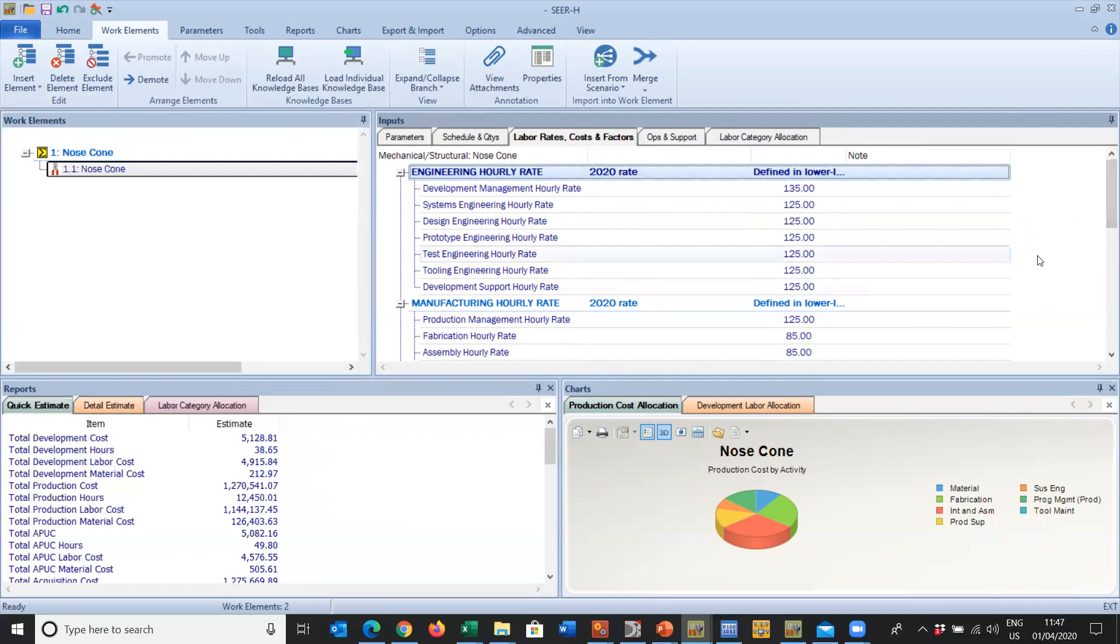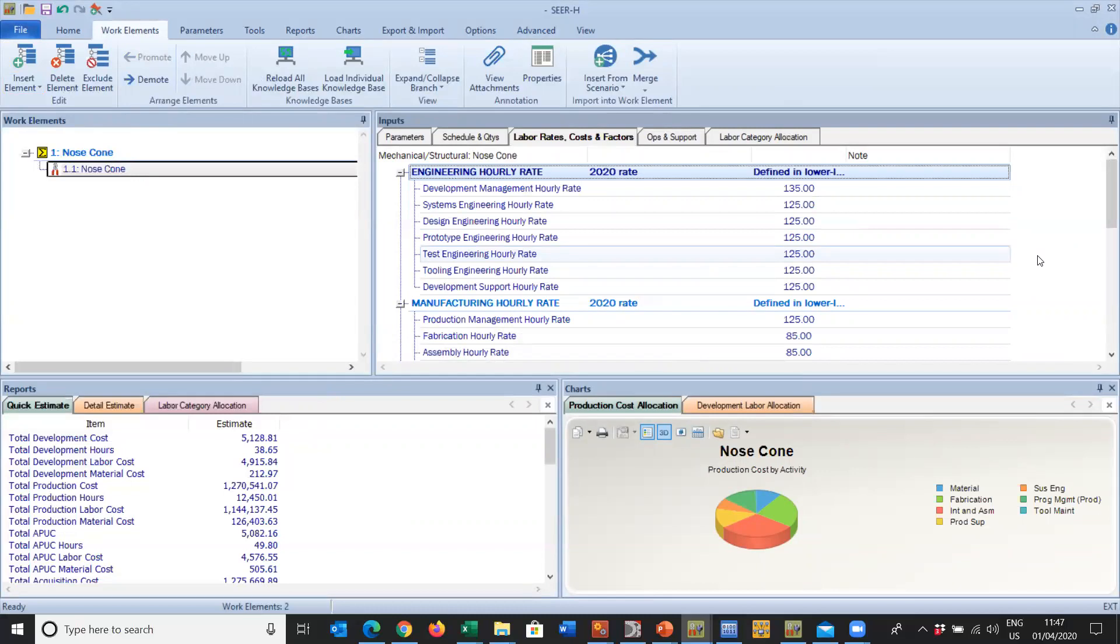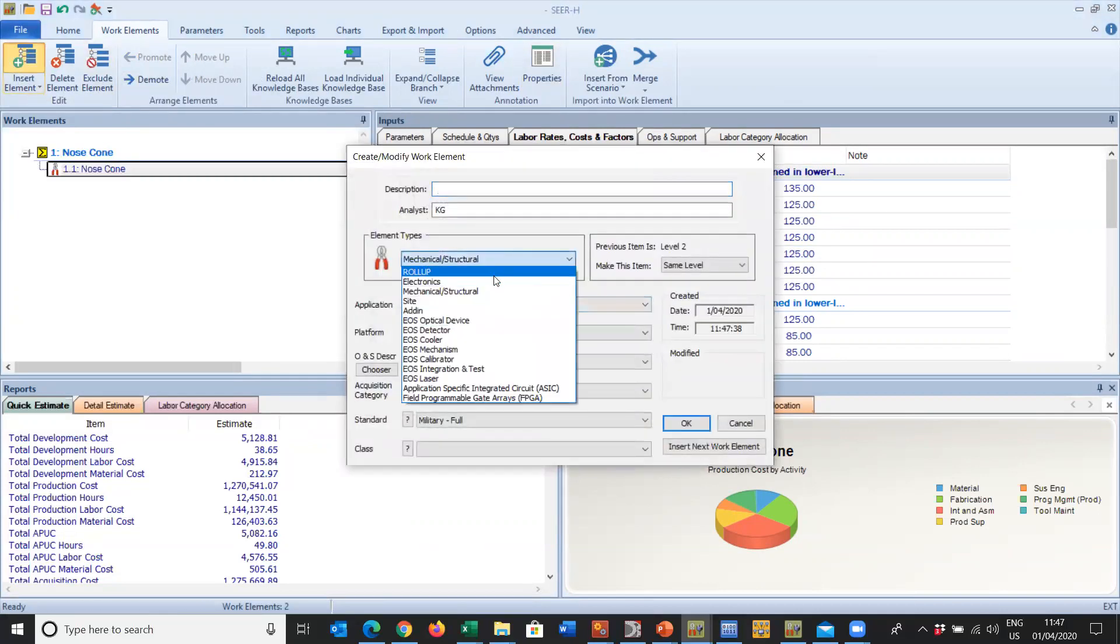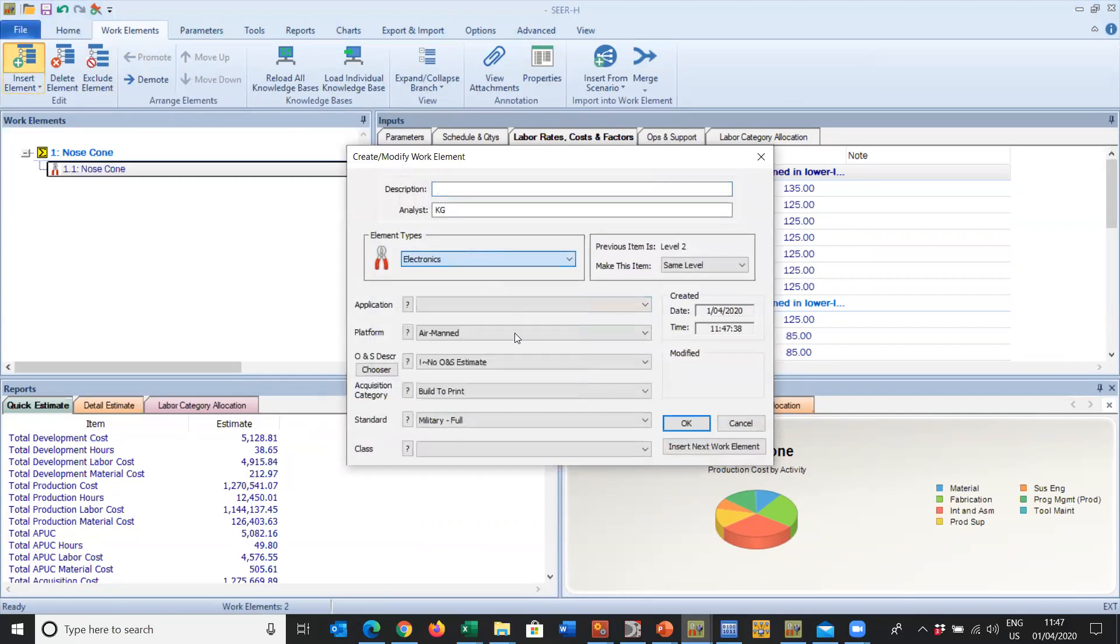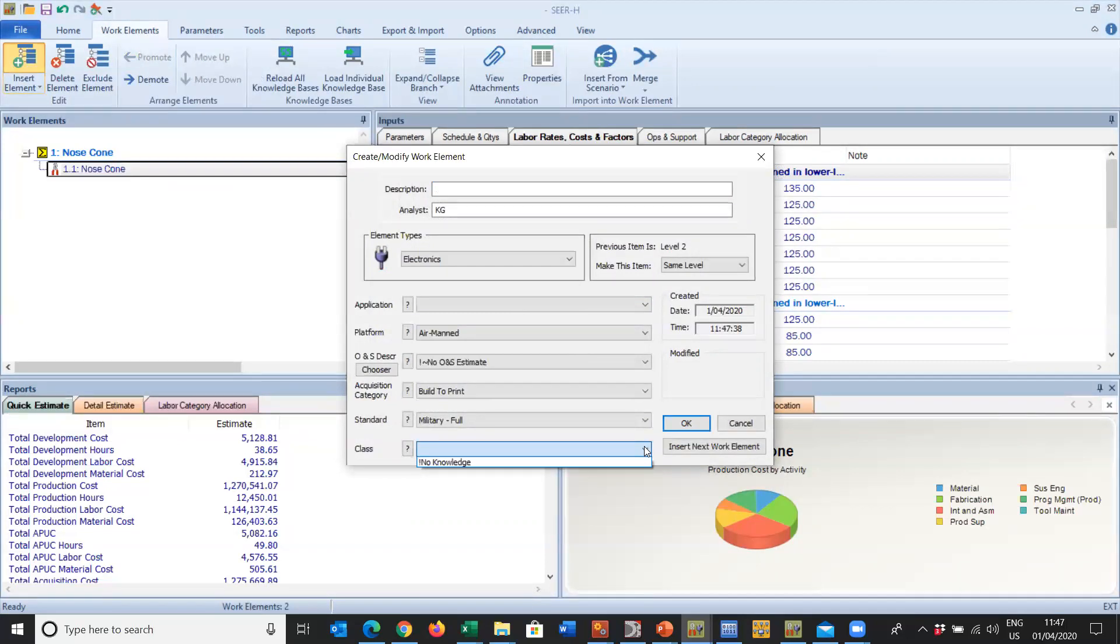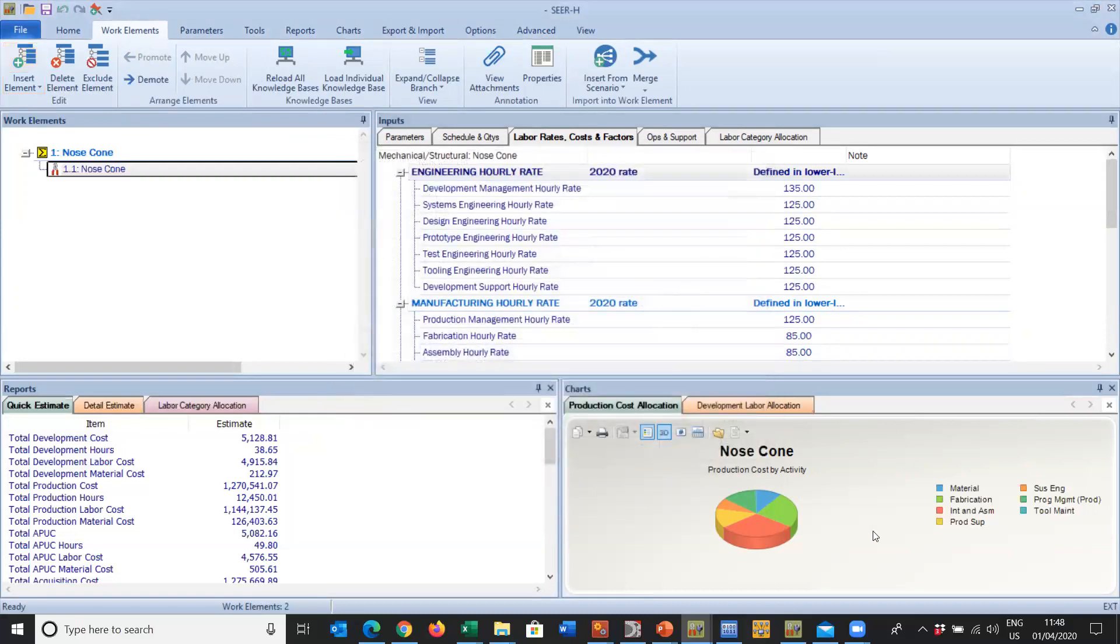Setting class knowledge bases are really good. They are very powerful. They start to introduce consistency, repeatability. It's something you don't overlook and it's always worthwhile. The one thing I would say is, while we're doing it, if I insert a second work element for electronics, our labor rates for 2020 aren't there. So you would have to repeat the process for an electronics work element. You just got to do that one more time if you want it to be in electronics. It may be different rates, maybe they're paid more, but you can do that also in mechanical.